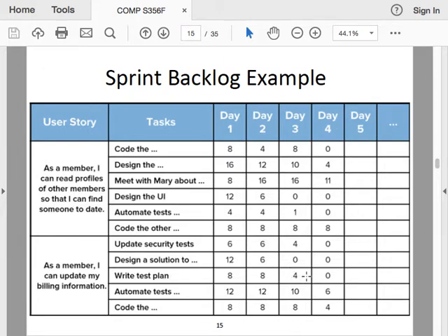As you can see, it's also actually decreasing. Okay, the general trend. Okay, and how many person days are left on day 4? 4 plus 11 plus 8 plus 6 plus 4 is 33. Okay, so 33 person days of work left.